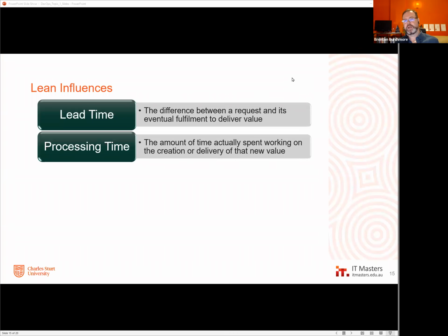And we used to call that like working hours or man hours or things like that. That's the time that's actually spent on the thing. The rest of the time is in waiting for something. And lean is all about reducing the wastage of everything, including idle time, the waiting time. So the principle of lean is, let's get rid of as much waiting as we can.